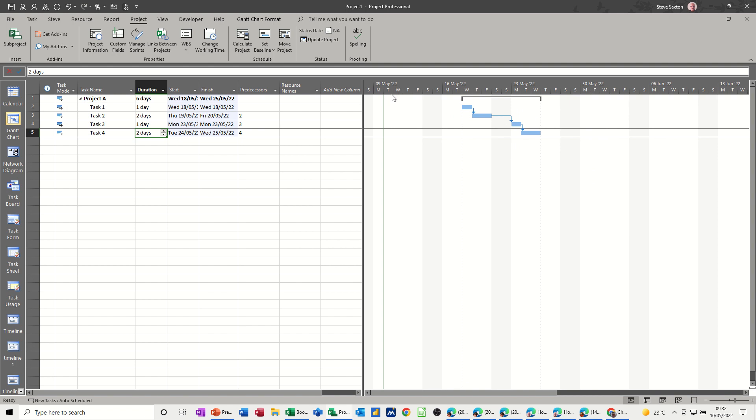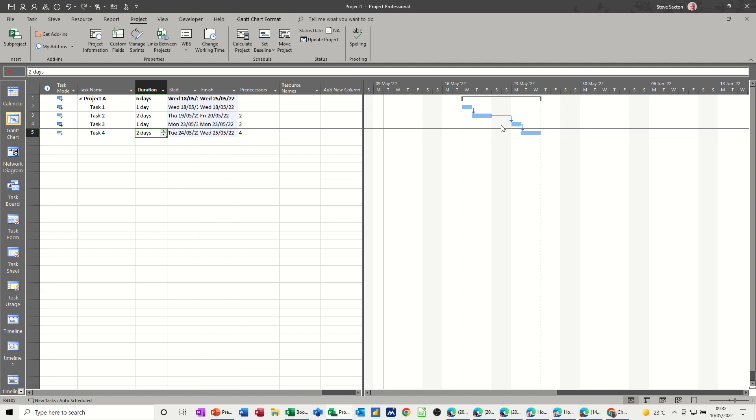So today is the 10th, which is here, Tuesday the 10th. So if you set that, that is basically everything you link is going to come back off that date. That's the end date. So hopefully you don't set this up and then find that these are all linking back and going back in time, past today, because obviously then that's not a doable thing, and you'd have to reduce some of these durations to make it fit. It's quite a common thing.